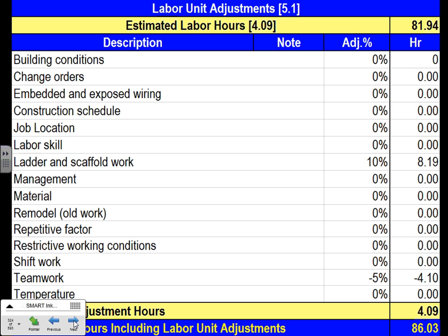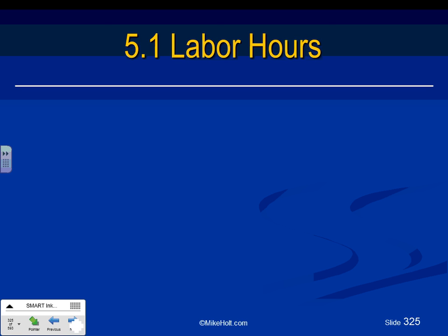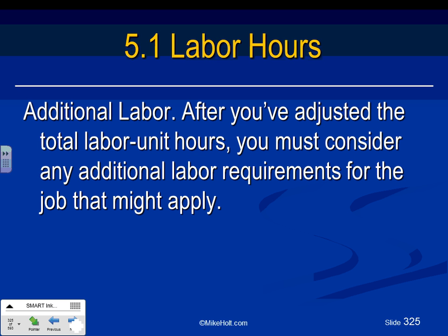So who cares? You're going to keep this in mind, guys. After you get your big lump sum dollar value here, you need to look at these values, look at the descriptions of these conditions, and see, should I adjust my labor? Any comments, guys, about adjusting the labor units after you get your labor units? In the McCormick software that we have, the labor unit you're going to see at the end, you can up it or lower it down. You can add a lot of things to your labor unit based on the conditions. Any comments about labor units? They call it labor units adjustment.